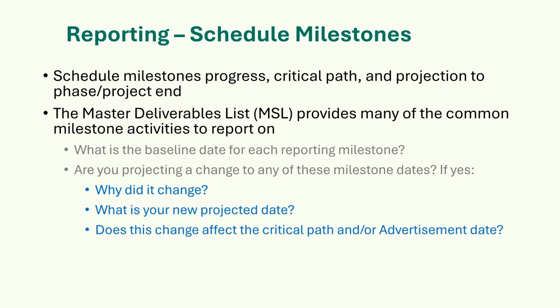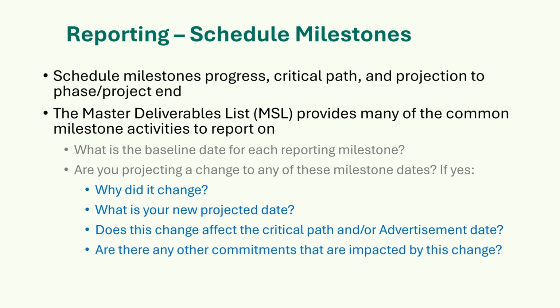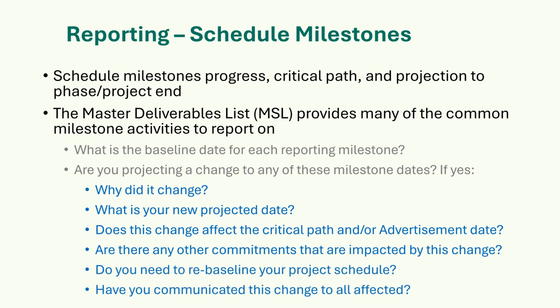Does this change affect the critical path and/or advertisement date? Are there any other commitments that are impacted by this change? Do you need to re-baseline your project schedule? Have you communicated this change to all affected teams?